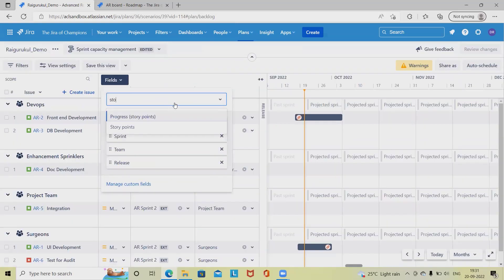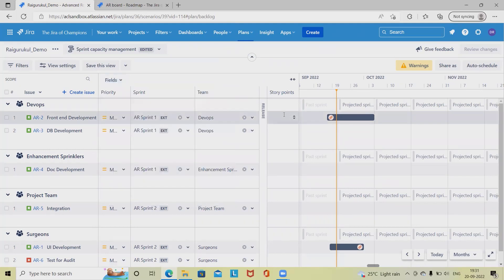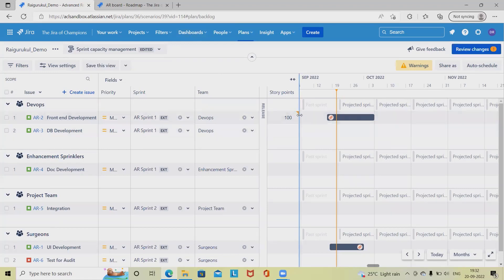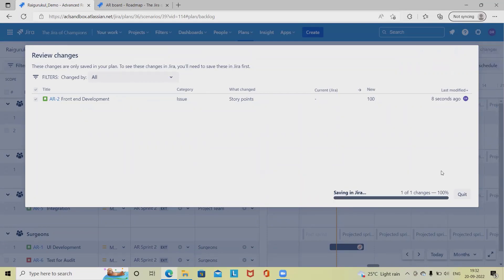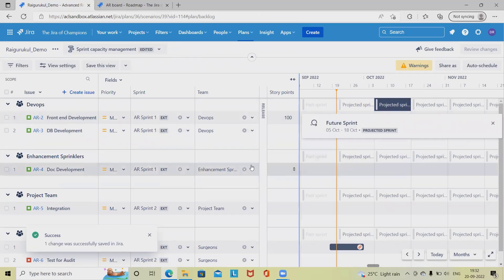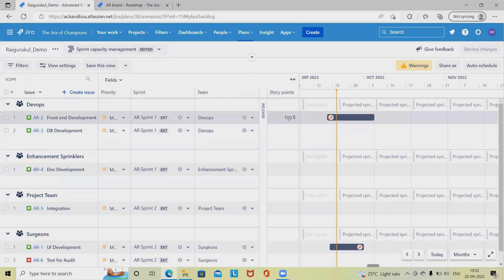If we add story points as an additional field, let's say a particular item is added with some story points and our capacity is being exceeded. If our capacity is 30 and I define 100, that will show in red — highlighting a warning that we have a capacity of just 30 story points but have allocated a block of 100, which might be a danger case. This is how we can highlight over-exceeded expectations for any particular team.